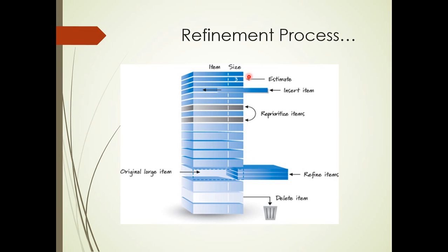Then the development team discusses the existing user stories to be selected for the upcoming sprint. The development team makes sure that they understand the essence of the user story, the product backlog item, and whether there are any dependencies or resource requirements. As per their analysis, they provide the estimates, and depending on the estimates, the product owner ranks these user stories in the backlog. So existing user stories are now more refined.